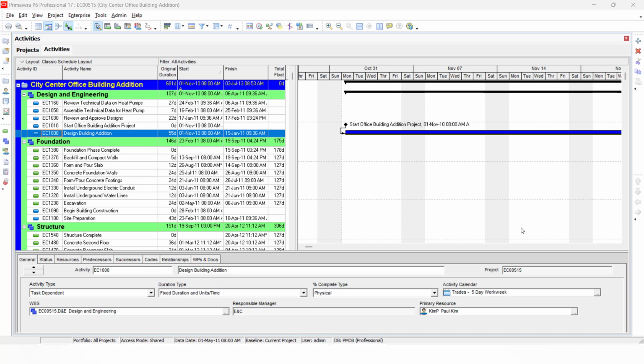For this tutorial video, we are going to discuss the third type of the Primavera calendar, the calendar that we call the resource calendar. So like the global calendar, resource calendar can also be assigned to one or more resources. But take note that in order to assign this resource calendar to a particular resource, here in our activity window, the type of the activity should be set to resource dependent.